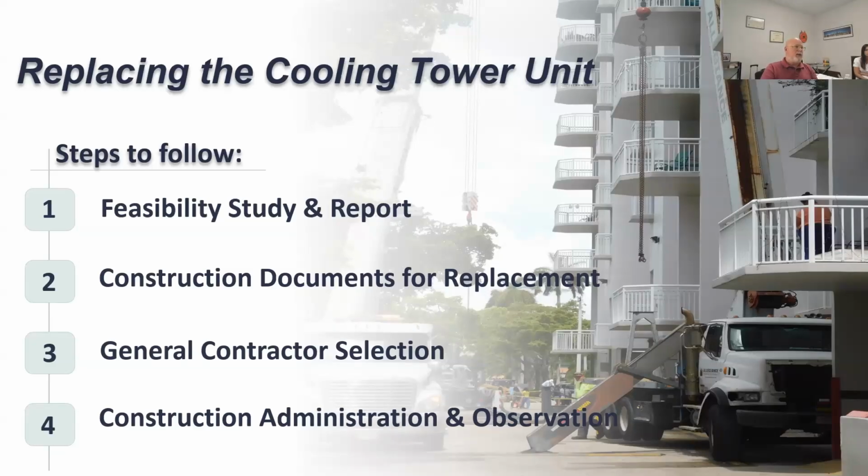Then go to construction documents, because again, this is something that's going to need to be permitted, and the various municipalities and authorities having jurisdiction are going to require signed and sealed drawings. So you definitely need to engage an engineer.